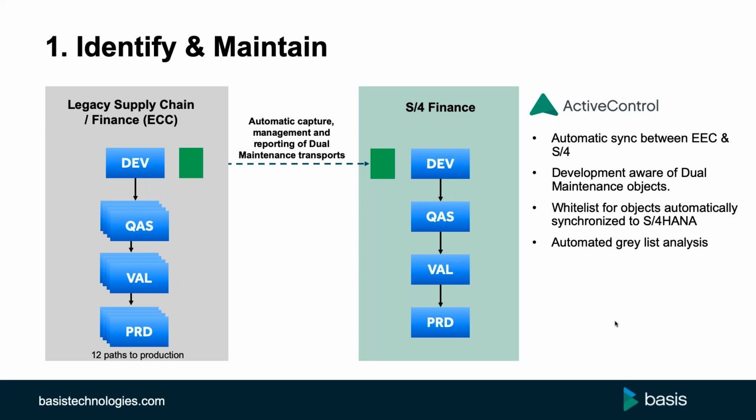But obviously, overall, we want to have a very clear picture of what changes are in scope, what changes can be automatically dual maintained, and therefore after review or even via scheduling that they happen automatically, and where do we stand in terms of the manual dual maintenance backlog.